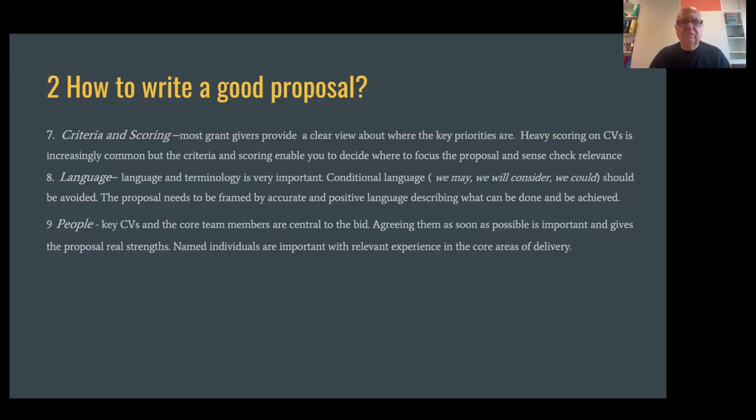One of the things that most grants and foundations hate is something called bait and switch. Sometimes what people do is they say, here is our team for the grant application, and they've got 5 great members. And then as soon as they get to the delivery point, the team is very different. You have to identify the core bid team, keep them, and they're the ones who are going to help you deliver.